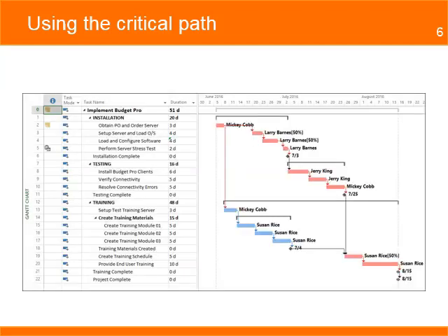The calculation for the critical path can be complex if the project is large. For those situations, project managers use scheduling software that can make the analysis much easier, especially when there is the need to explore different scenarios. Most scheduling software, such as MS Project, can automatically calculate the critical path and identify the activities or tasks that are in the critical path.